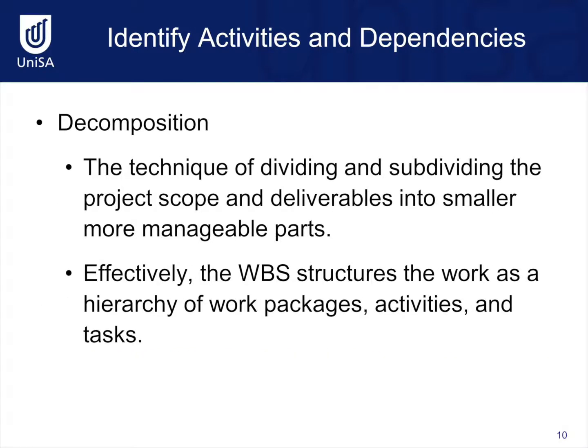The only way to successfully identify activities and create a WBS is by decomposition. Dividing and subdividing the project scope and deliverables into smaller manageable parts. Breaking down tasks and decomposing tasks into more manageable tasks or parts is key to achieving success in a project, regardless of how small or large that project is.